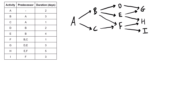Looking at our rough draft, we don't have any crossovers — that's really good. If there were arrows crossing over, I'd recommend redrawing until you have the minimum amount of crossovers. We see we have one starting activity, which is A, and on the right side G, H, and I are all final activities. None of those three have any activities coming after them, and that will be significant when we get into the forward and backward pass.